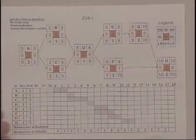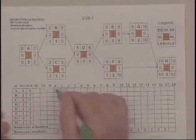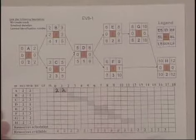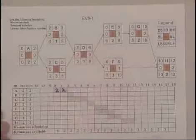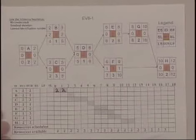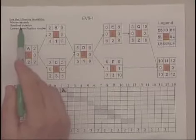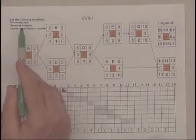When we look at activity A, there's not a problem because it only requires two tractors. But when it comes time to starting B and C, each of them requires two so we have to make a choice. This is where the heuristics come into play. These are the rules that the computer uses to optimize the schedule.